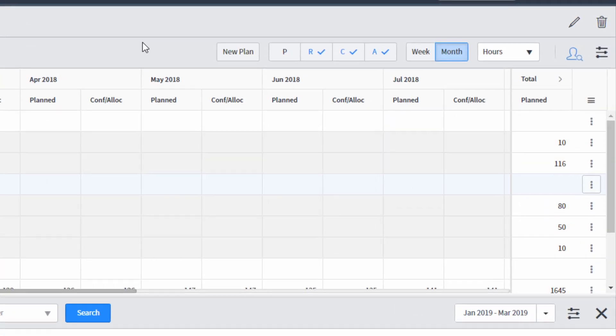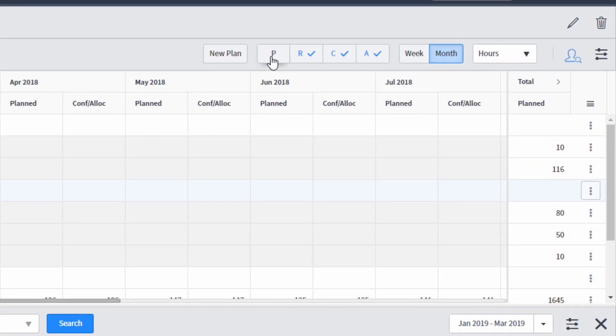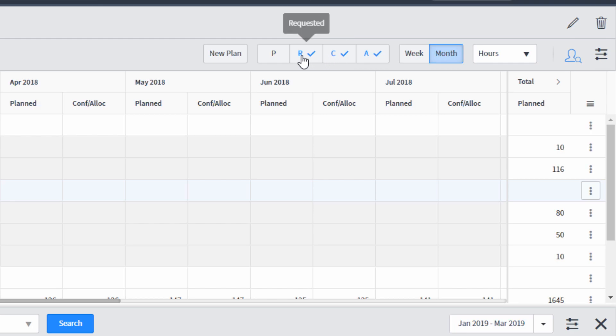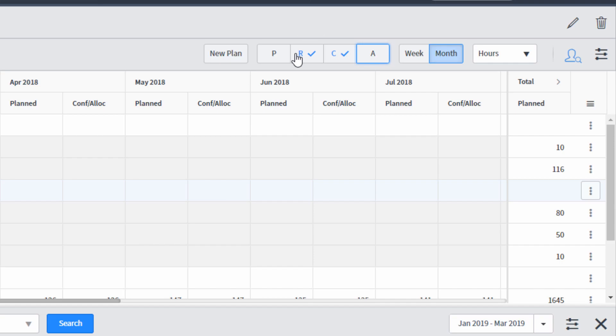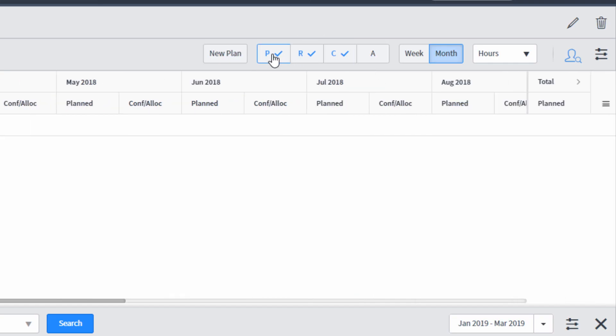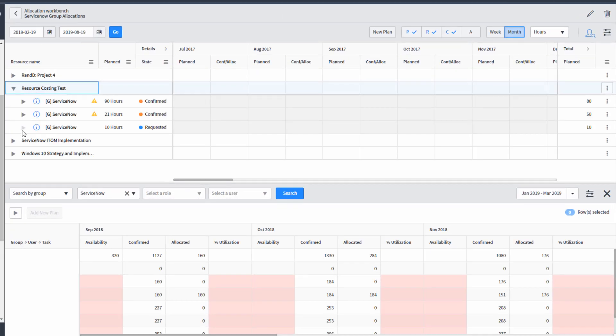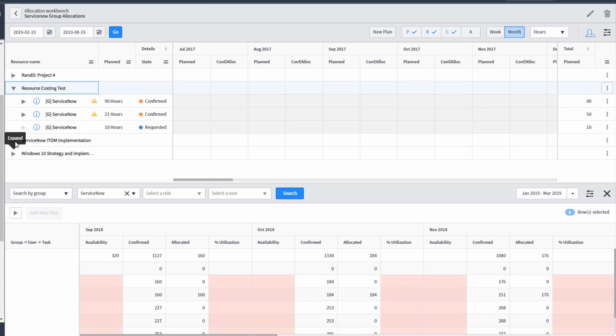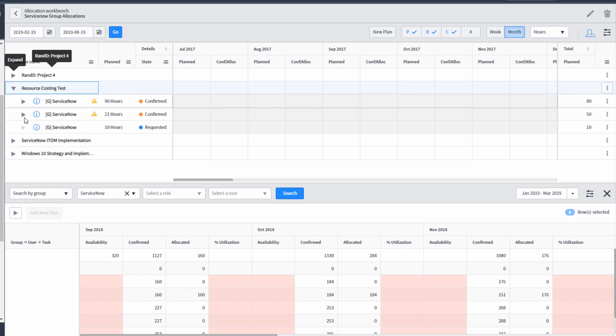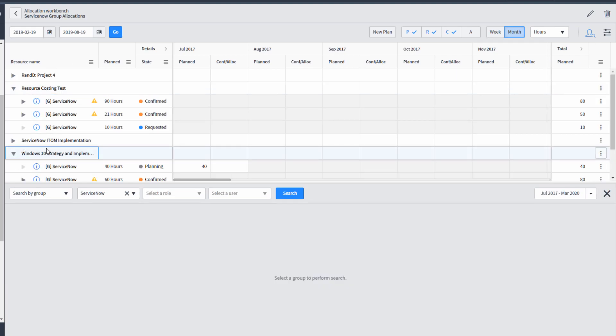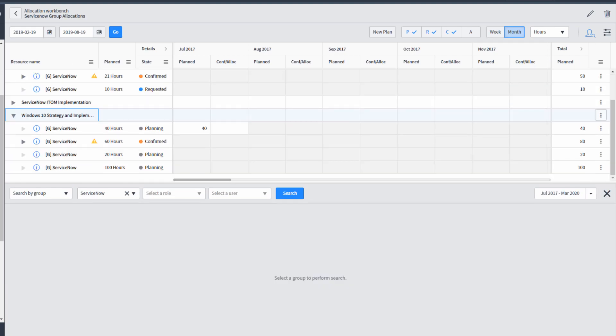It has the first letter of each state of a resource plan. So we have allocated, confirmed, requested, and planned. And so if I say remove allocated and add planned, that will change the list of resource plans that we see on our workbench. So we'll no longer see allocated, but we are seeing planned. This might be handy so you can anticipate resource plans that are coming from project managers that haven't been formally asked for.